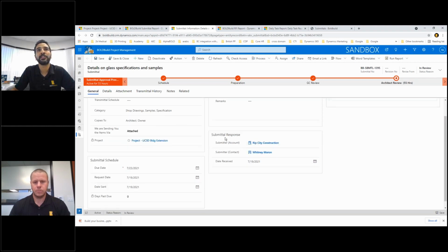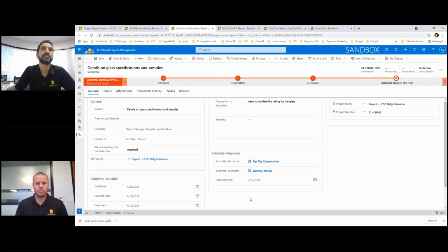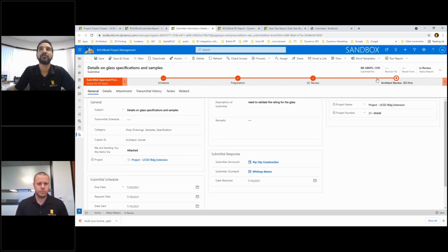I am here saying who would be my submitter, who would be sending me the samples that I am asking for. So it is Rip City Construction, and I have the due date, the requested date and the date sent here. Up here, I have my flow for this submittal, so I can be in the scheduling stage, then I can move into the preparation stage. In the preparation stage, it's actually the responder, which in this case is the submitter, who is going to respond to my submittal, and then it goes through a review cycle, and then it goes into an architectural review.